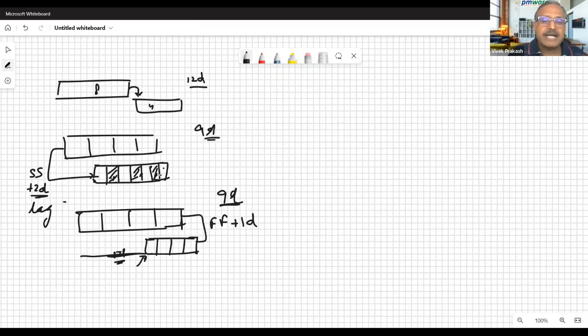So the whole thing is that the same situation we can schedule in 3 different ways. In the first way, it is taking longer time. In the second way, it is taking lesser time, but the resource allocation is not very efficient. In the third, our resource allocation also becomes very efficient and it takes lesser time. Right? Is it clear how these SS and FF work?